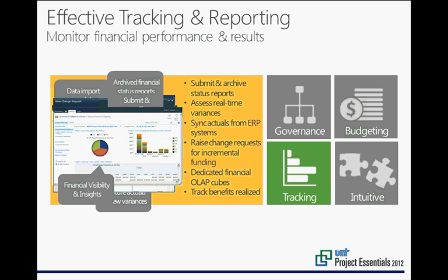Again, as mentioned earlier, if your forecast is exceeding your budget, you may want to create a change request, and the solution allows you to create change requests for incremental funding and route change requests for approval. Once approved, your budget will be updated accordingly, and a record of the changes is maintained, original budget to revised budget.